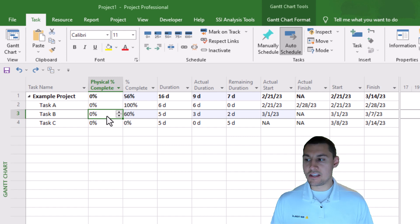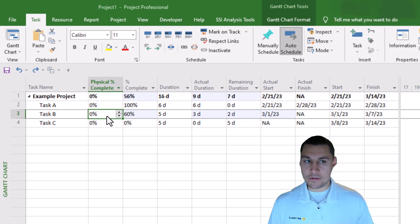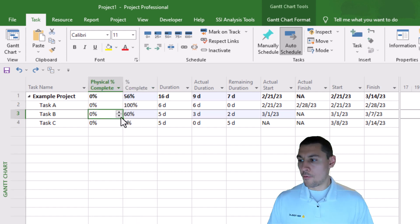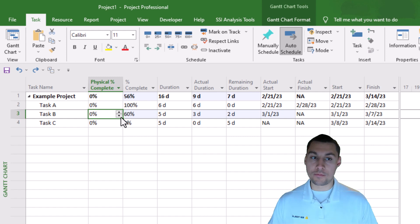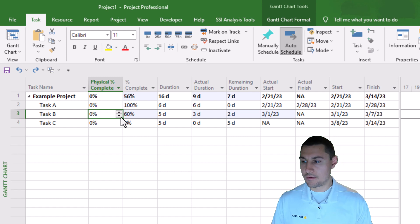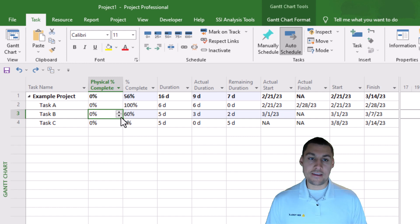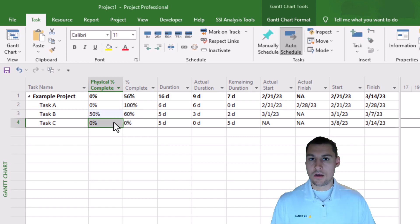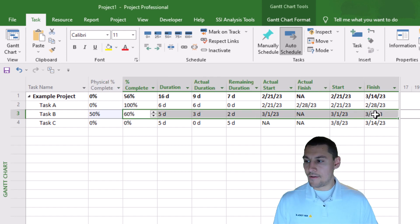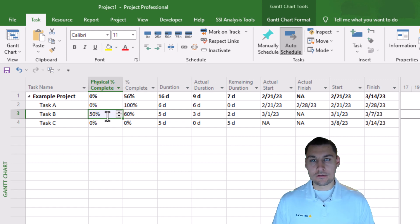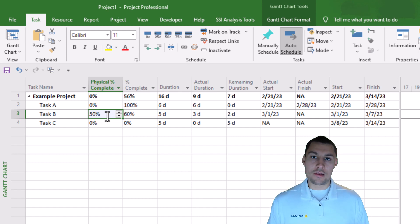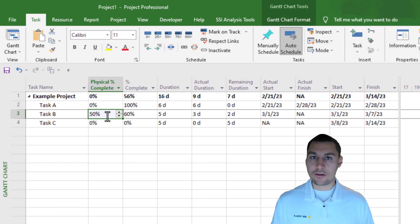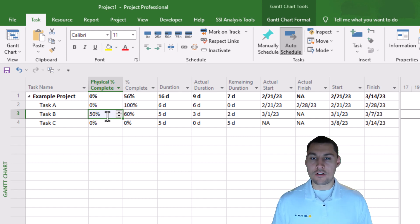For physical percent complete, manually entering a value is perfectly okay because entering a value here is not going to affect any other fields on the task. Let's pretend I'm still statusing task B with my team members. I've already figured out the updated start and finish dates and used the mark on track button to get my regular percent complete. Now I want to ask another question: how far along do we think we are with the task from the perspective of whoever is responsible for doing it? They may give us a number that's different than the regular percent complete. Let's say they say they think they're 50% done, in which case I plug in 50. Notice that after I entered this number, none of the other fields were affected for task B — physical percent complete is just a static, assessed field.